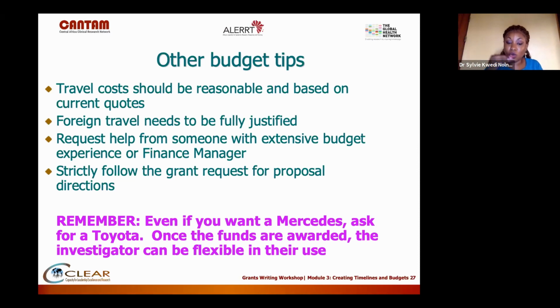Now you go into negotiations with the funders, and then there's a time for contract signing. I have had 12 months go by from the time I got awarded to the time I actually received money for the grant. So now you are 2 years away from when you first set up your budget. Things may have changed, but that is what you committed to.